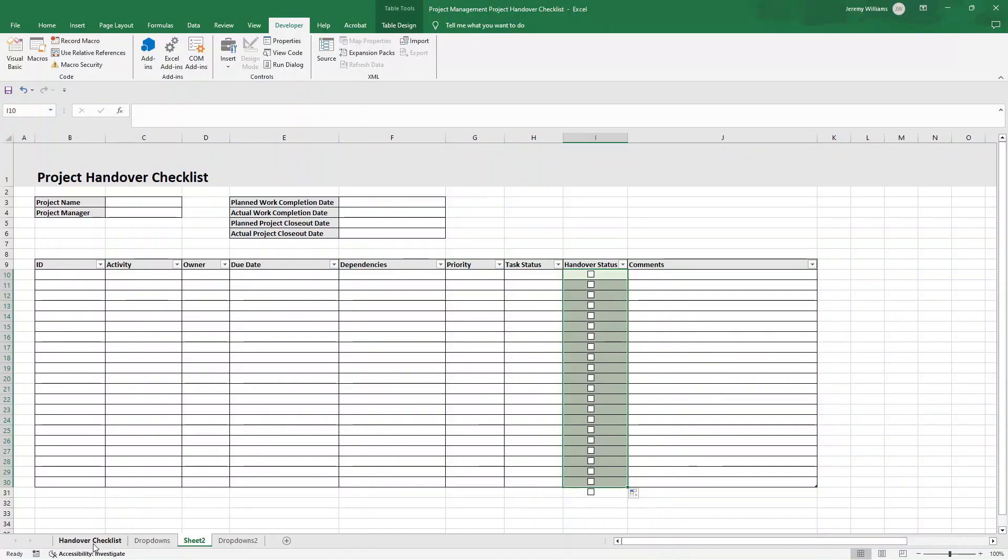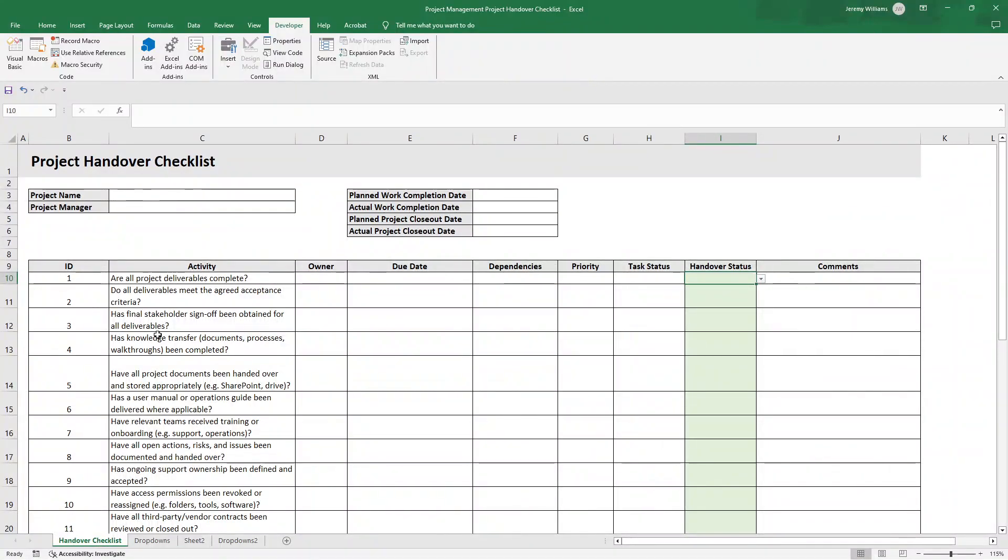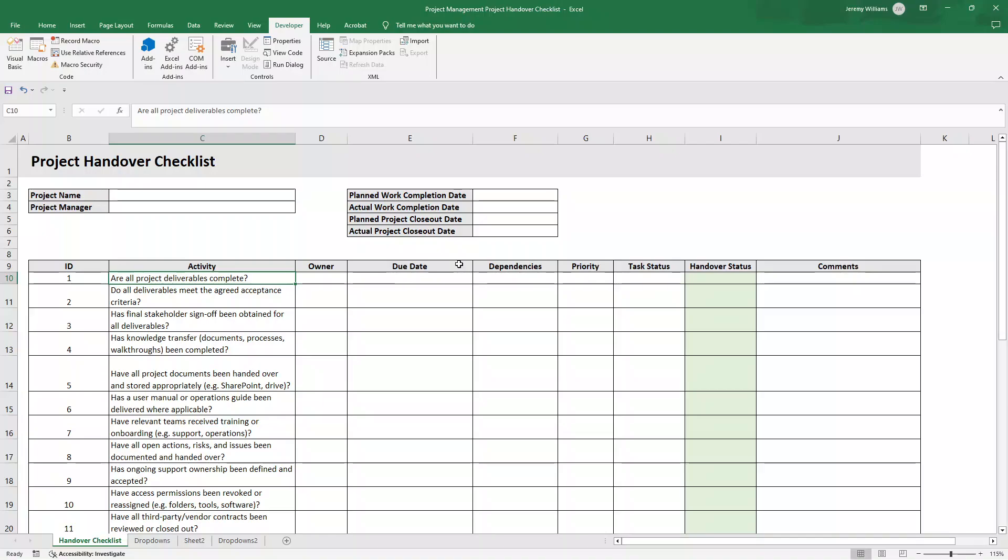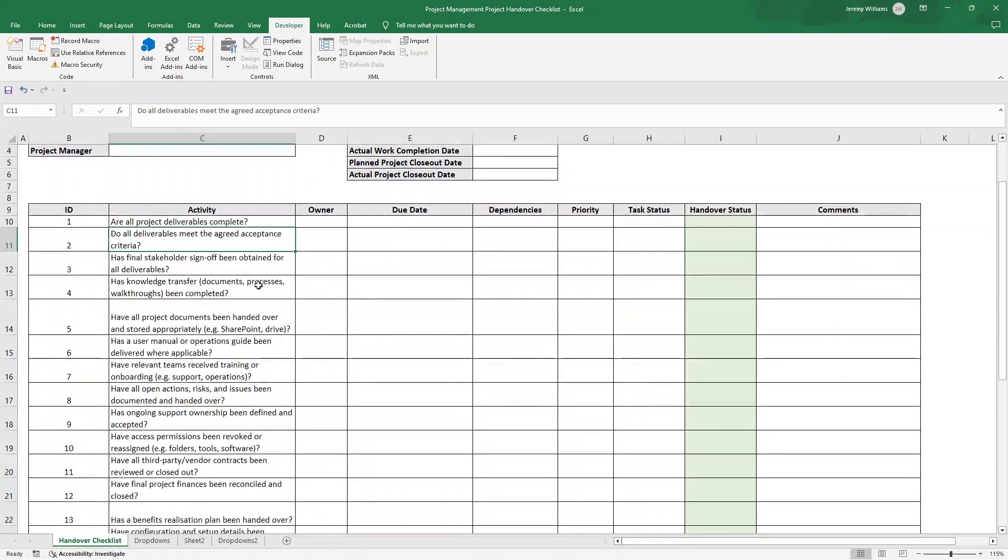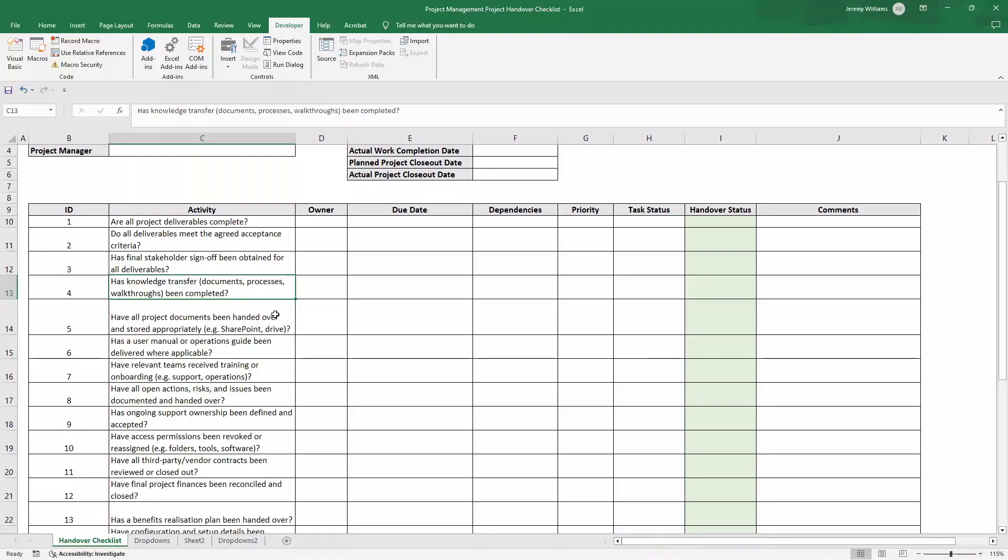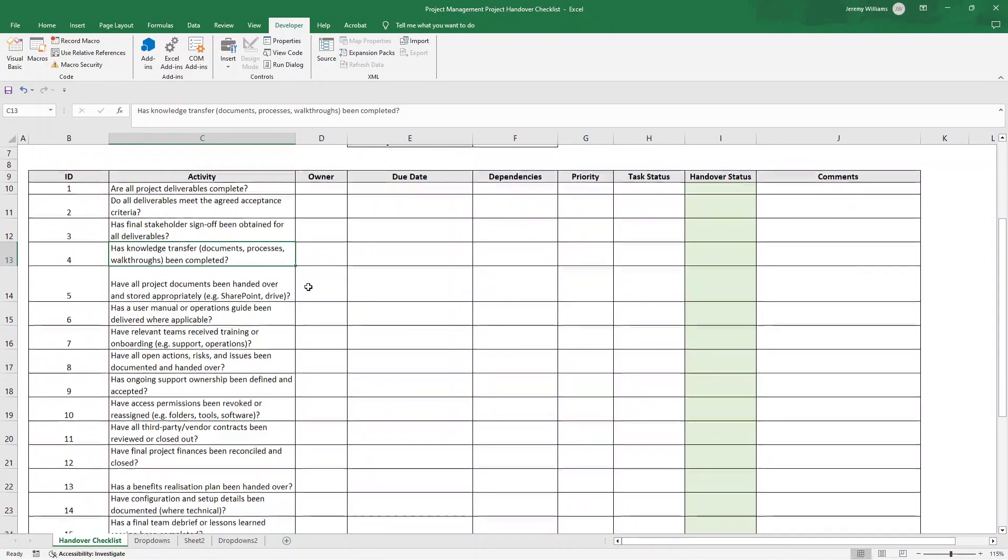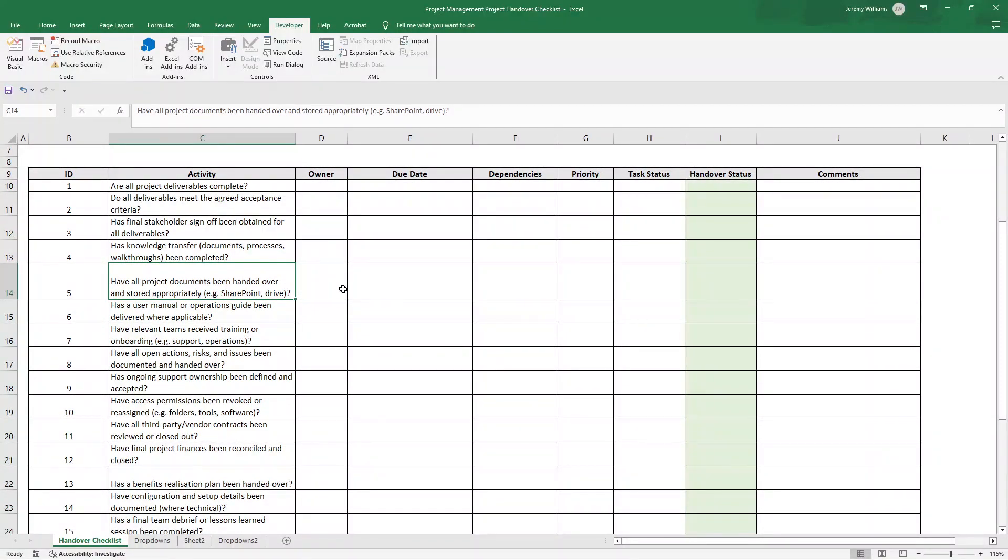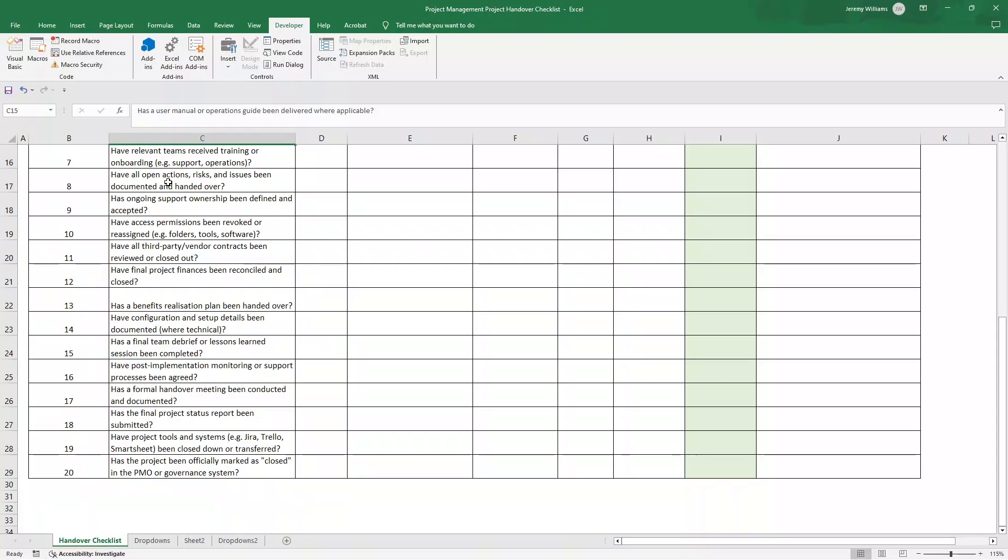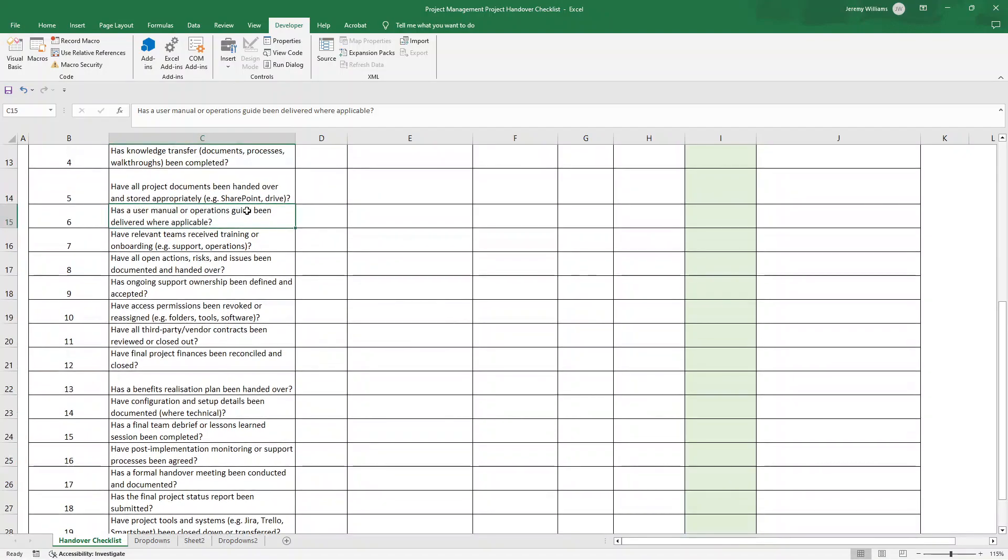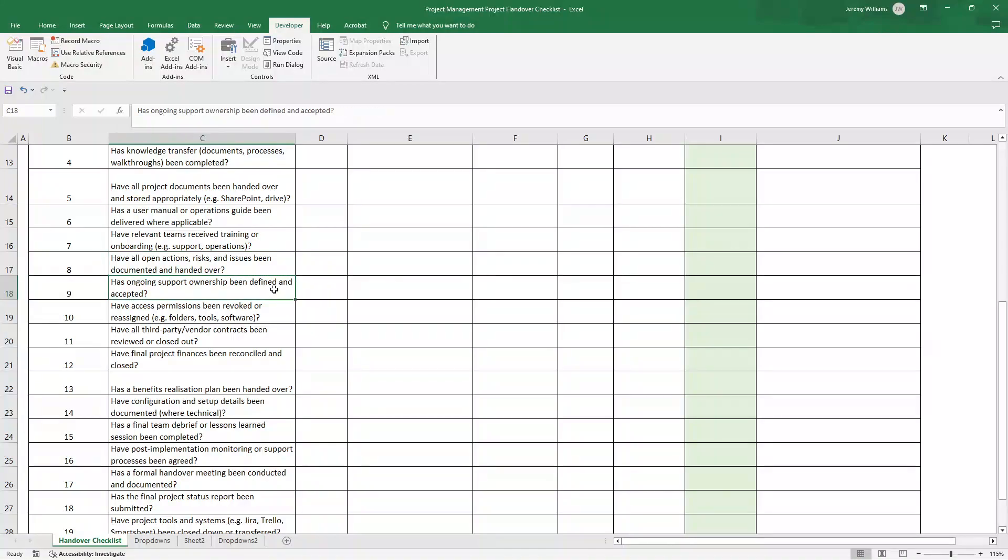Now, before we finish up, I promised I'd walk through some of the checklist items. Let me just run through some of these. Again, you can pause the video and take a look at these if you wanted to. Are all projects deliverables complete? Now, I've created these in order of what you'd likely go through as part of a handover. So it is almost in a chronological order. Do all deliverables meet the agreed acceptance criteria? Has final stakeholder sign off been obtained for all deliverables? Has knowledge transfer documents processes walkthroughs been completed? Have all project documents been handed over and stored appropriately, for instance, on the SharePoint or Drive? Has a user manual or operations guide been delivered?